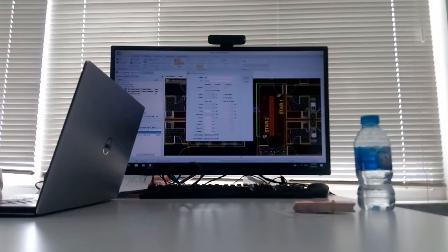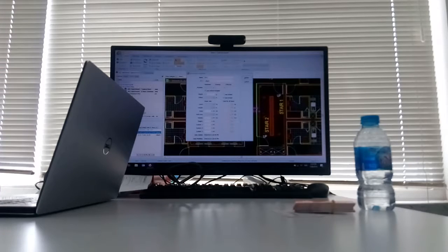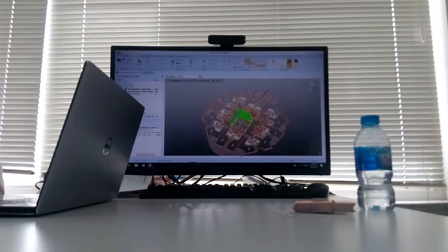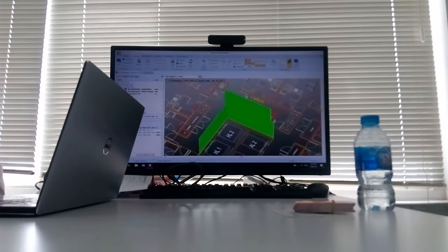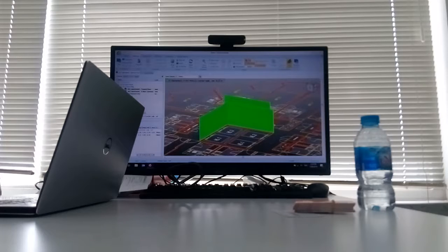Then there's an option whether you want to adjust directly based on the height. Maybe the beam height over here is 300. After you deduct, it will become 2.5. Then this is already deducted. When I have this and the other one I have not adjusted, just for you to preview, you can view in 3D. So you can cross check over here whether you have deducted or not.